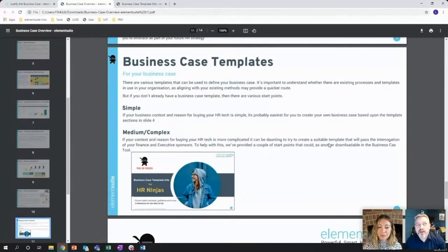Yeah. So I would be driven by the heat map to make a call on that. So if you've got this portion of your heat map that's really green and people like the systems and whatever else, you don't really want to be ripping that out for the benefit of doing one big thing. If you've got a lot of red scattered all over your heat map, then maybe it's worth doing something big, a hard change that's cross company, and you just do the change once. I think most companies will go, we'll do this module and this module first, and we'll manage the business change around that.